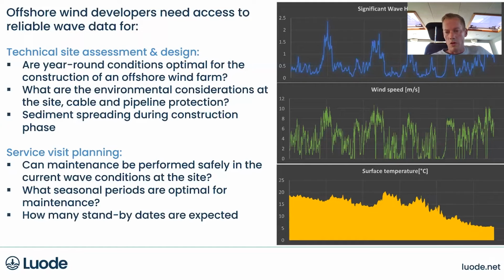So it might be that we have almost full summer already in the southern part of the Baltic Sea and the Finnish waters, while at the same time in the northern part there's still sea ice. And when the ice breakup is taking place, quite often these huge ice floes start to float with the currents, and then they cause risk to the construction vessels. So this is always a balancing act: when you can start your construction work, and when you can say that now there's no big risk anymore of drifting ice spoiling your work, for example.